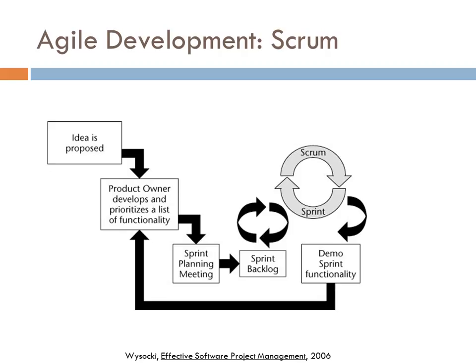It's also divided up into tasks, and the developers actually choose the tasks that they're going to do. So they'll take a project and break it up into different sections, usually about 8 to 16 hours of work. And they'll say, all right, I'll take task 1.7, and the other one will say, all right, I'll take 1.4, and then they'll all just combine at the end of that iteration.